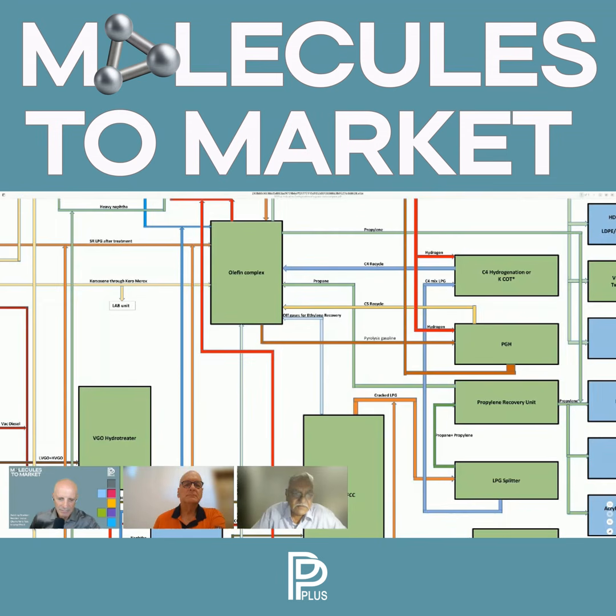And there are a lot of aspects around that particular plant which are also required to carry out the feasibility study. And the third and most important part is, what is the mode of implementation which we have in mind? Now, typically in the West, what I've noticed is most of the projects are built on a FEED plus EPC kind of route. That means you do a FEED document, select an EPC contractor, and the EPC builds the project. That's one way of doing the project.